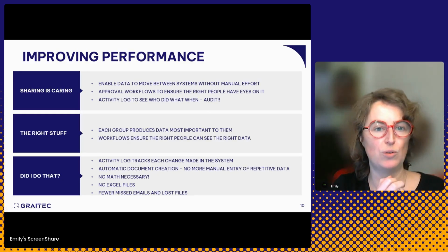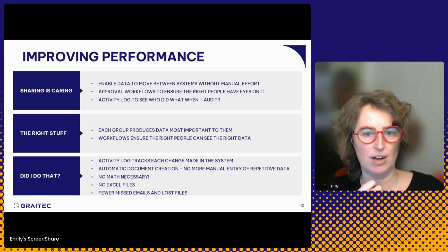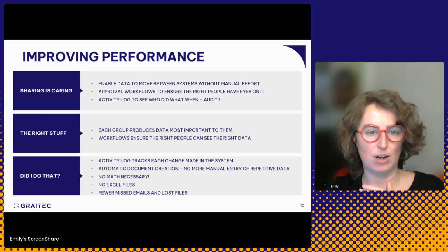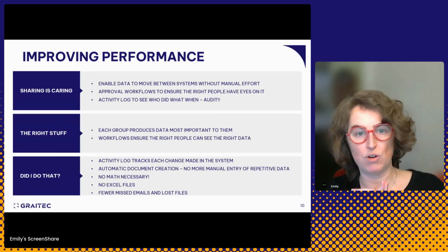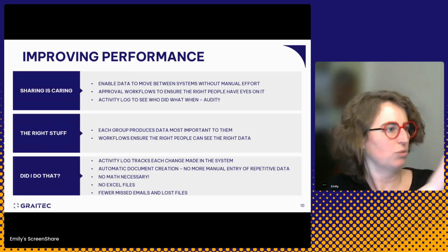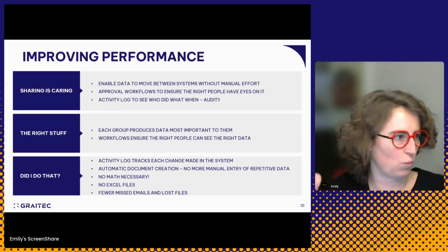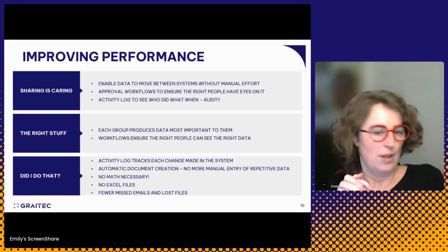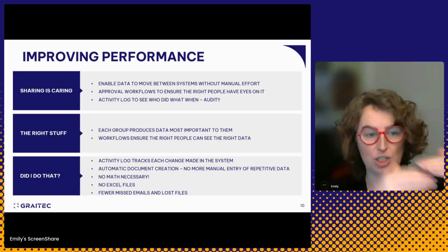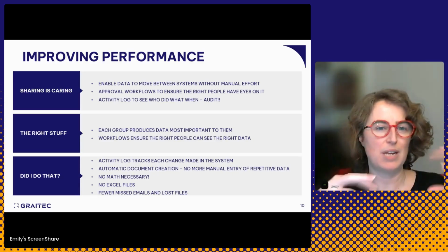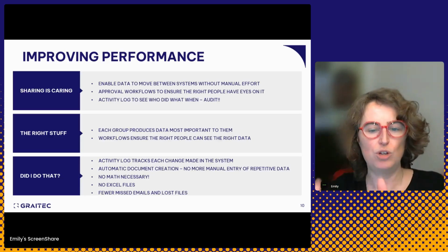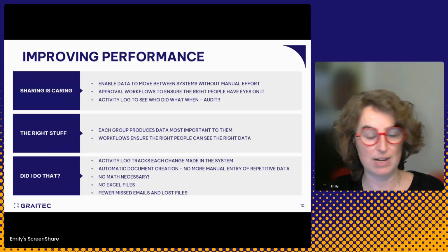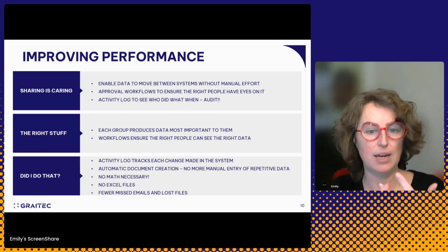So when we talk about who is doing what in which system, who is issuing documentation, who is stamping data, etc. In cost, we have automatic document creation. So you are not repeatedly entering, looking over at this screen to fill out your Excel or your Word document and then sending it off. And oops, I typed in a 6 instead of a 5. That ideally doesn't happen. If the budget is correct and all of those connections I talked about at the beginning are built out correctly, when you issue a contract document, that contract is going to pull the information that you filled out elsewhere that hopefully has had a few eyes on it and is correct.